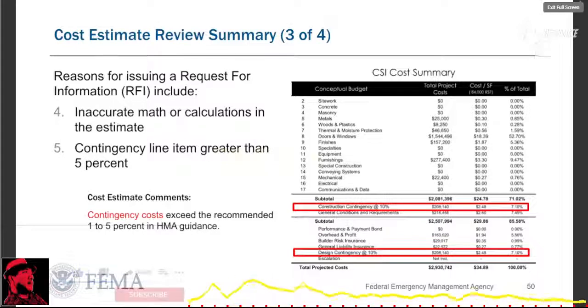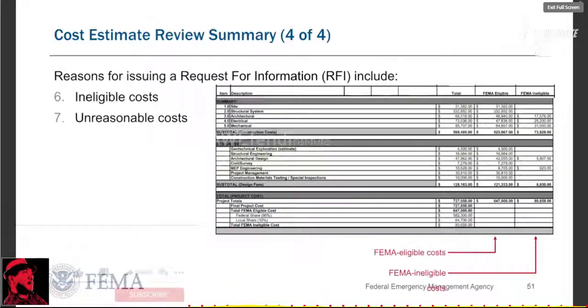So as we talked about earlier, there are allowances for major project scope changes, unforeseen risks, or extraordinary events like the inflation rates we have today, and they can be included, but not as contingency costs, but rather standalone cost items in the budget estimate. Next slide.